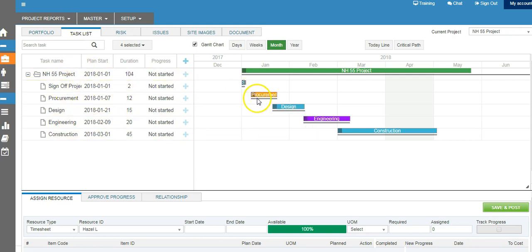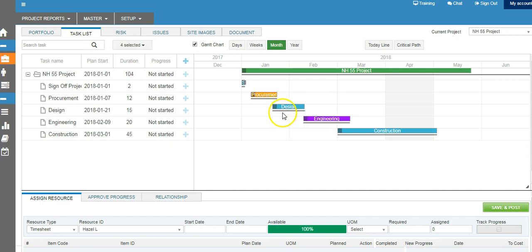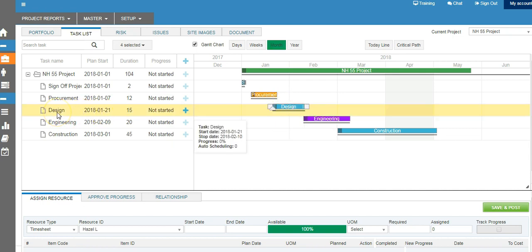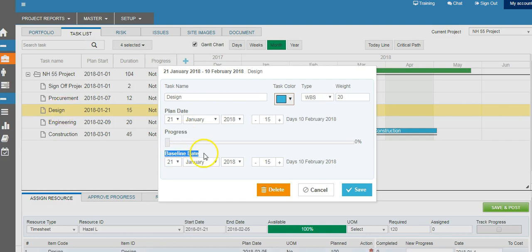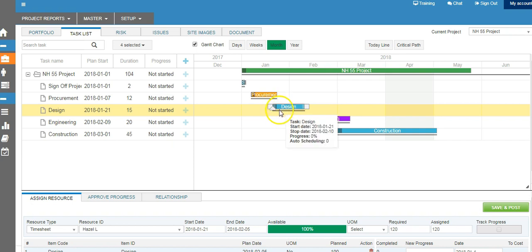You will see there are two bars: there is always a black line underneath and a bar above. That black line is the original plan duration line — the baseline. So initially the plan was on 21st of January and the baseline is also on 21st of January. When you move the bar, the baseline doesn't move — it always stays there, showing you what the original plan was.